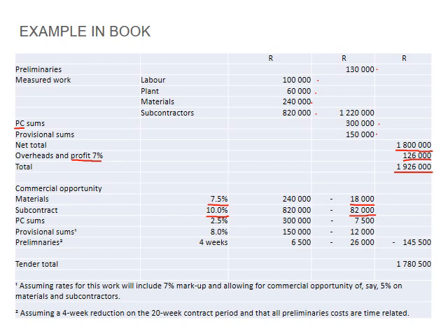You might also find at tender stage your subcontractors might price a little bit higher, because they don't know the exact scope, but you anticipate as the scope gets clearer that they might give you a discount on the appointment, and you can negotiate a lower term with them. So you anticipate that, okay, I can maybe have a saving of 10% on this.